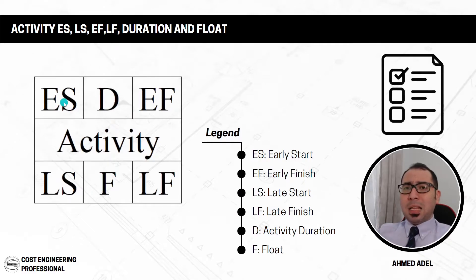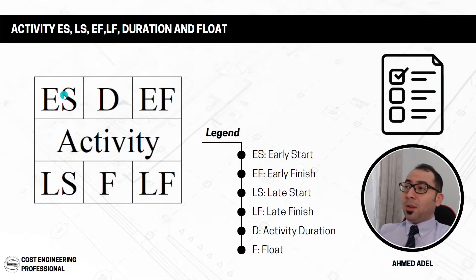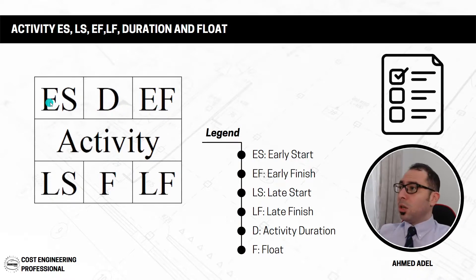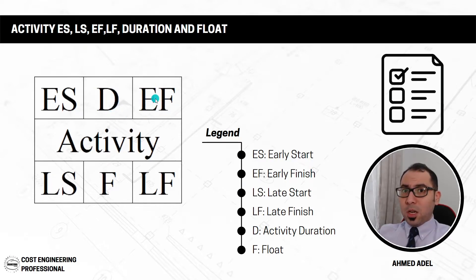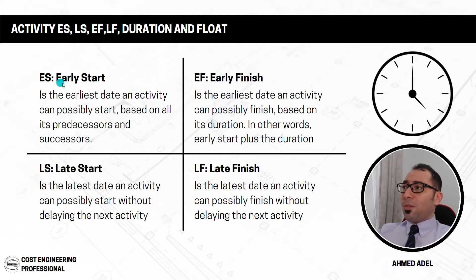There is a confusing point regarding the early start: sometimes people start from day one and sometimes from zero. Starting from zero is much better. With zero-based counting, early finish equals early start plus duration — so zero plus five equals five. If you start from one, you'd need to calculate one plus five minus one to get the correct early finish, which is more error-prone. Always start with zero.